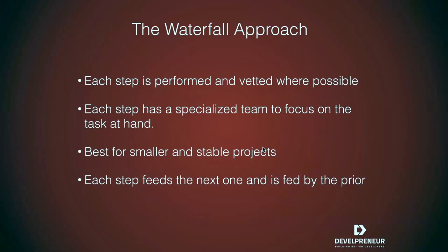have, to some extent, a specialized team that focuses on that task or the tasks for that step. So in the requirements phase, you're going to have people that's what they do. Your team is going to be the people that are best suited to gather and document your requirements. When you move into the design phase, the people working on the project are the designers. When you get in the implementation phase, the people working on it are those that are best at implementing. Now, that doesn't mean that you never speak again to the people that do requirements or the people that do design, but ideally, if it was done right, they really don't have to.